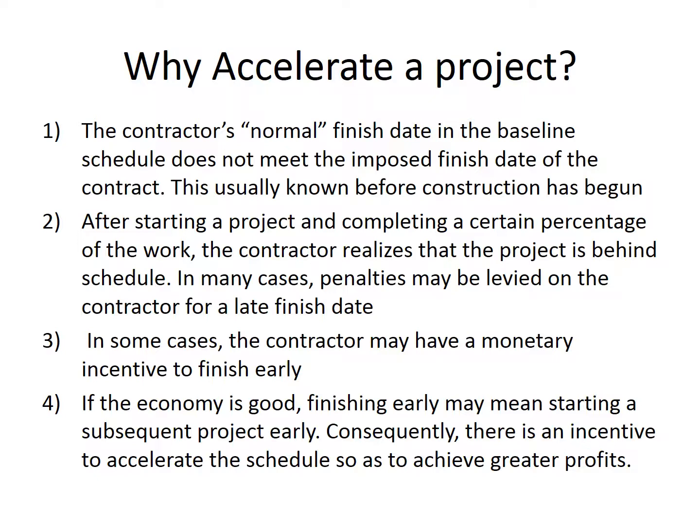Under a cost-plus type contract or other delivery method, the contractor may be able to acquire some type of bonus. So that incentivizes the acceleration of the project. If the economy is good, finishing early may mean starting a subsequent project early. As a matter of fact, who doesn't like to have stuff before it was expected? So there is often a financial incentive for completing things early, but there's also the satisfaction that an owner might derive from being handed over a project early. Plus, it means you get to make more money. Not only do you please the owner, but you get to go on and finish more work if you finish early.